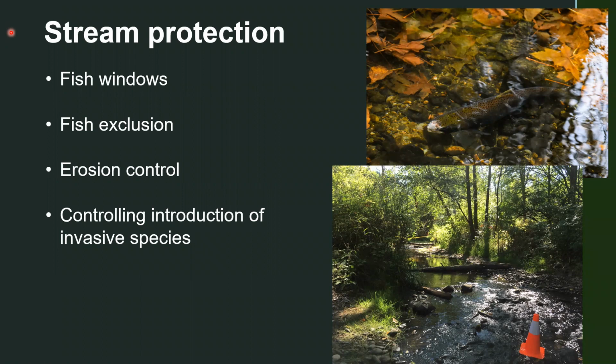For the areas where we will need to do some work in the water per se, we will also be excluding fish from the work area, both upstream and downstream. In most of the cases in this project, we will be working in the dry, as we say. We'll be putting some kind of cofferdam or something to prevent water from entering the work area. What we'll also be doing is having trained biologists on site with nets to prevent fish from entering the work area.